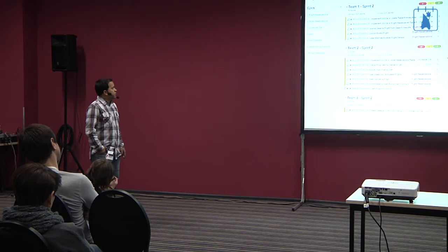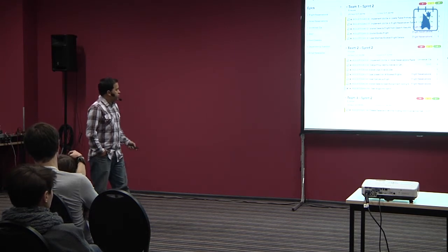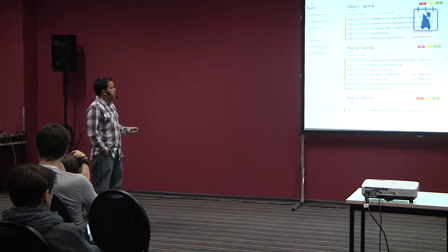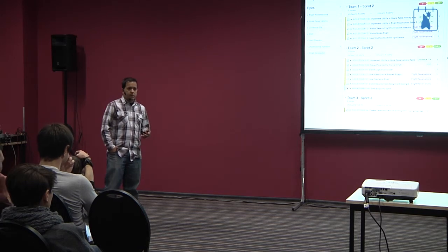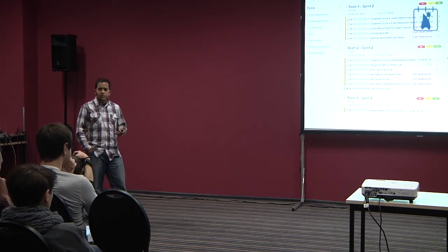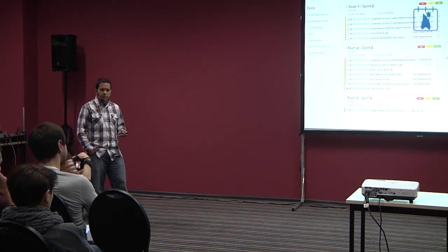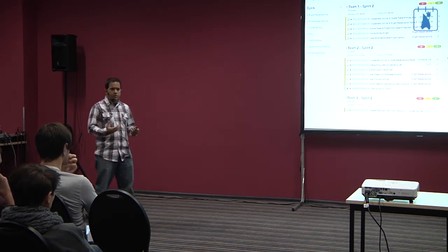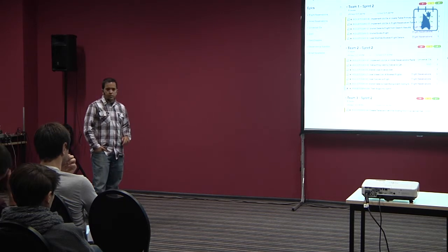So if I take a look here, these are all the different stories that are being developed in the system right now, which includes some architecture work, some product work, and so forth. This all of a sudden makes a lot of sense, because whenever I start my sprint, I know how many points I can put for product and how many points I can put for architecture, and that split is predefined. There's no misalignment between the product folks and the non-product work that needs to be done.